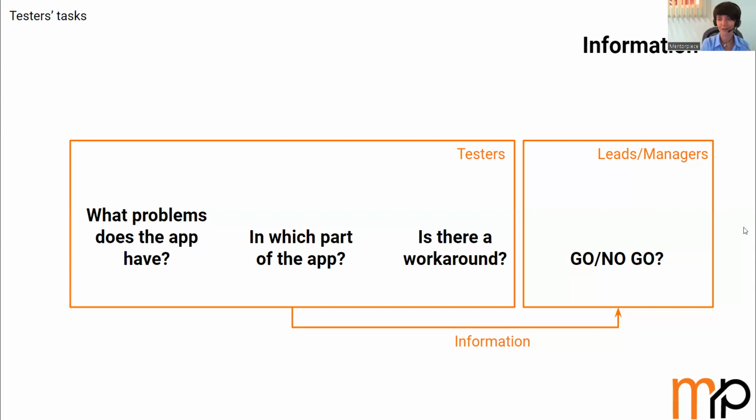If this gate is described as we can have 10 defects, not more, and we have only 9 defects, we will go to the release with this version. And probably you, as an end user, will use this application, and you will be very angry about these 9 defects, but the product owner or project manager or some business guy decided that 9 defects is okay.